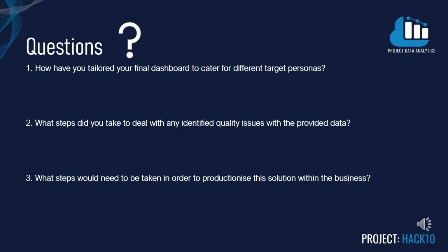Another example was with the project's start and finish dates. About 80% of these fields were missing, so to get a complete picture of the project duration, we rejected these values and instead used the CTR finish and start date, as this would be the official start and end date of our project. And for question 3,